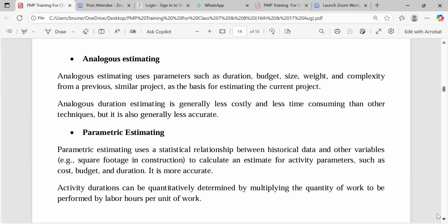If somebody asks you to paint a wall, you can now use your tape and say 1 square foot will take a bucket of paint. Since we are painting 75 square feet of wall, it is 1 times 75. That's an accurate estimate.